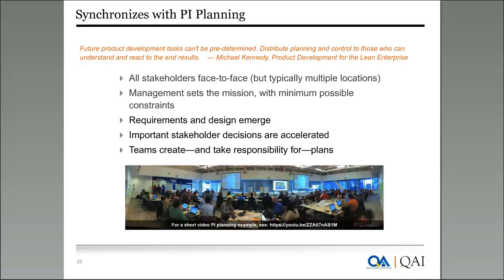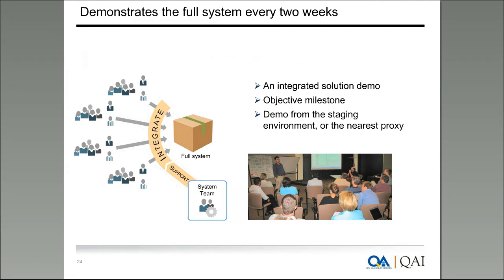make the decision there, most of the decisions, and they will also identify what kind of risks are there and how to mitigate them. For those that cannot be mitigated, people are identified to own the risks and address the challenges. Program increment planning is not just identifying what each team needs to do in the next 3 months, but also having a face-to-face meeting so that all these other key issues get resolved.